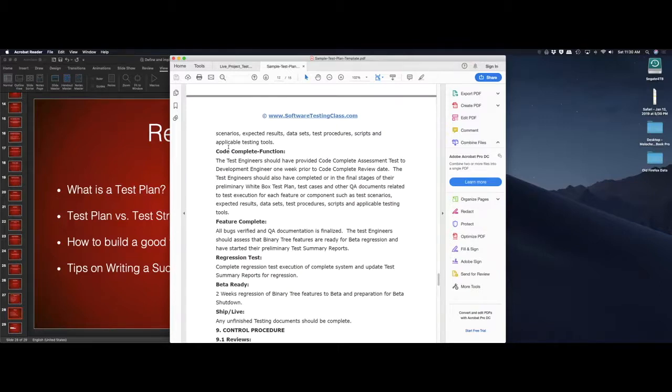So you have that first window of just getting the code done. Then it gets to QA. QA has a period of time to go through the code complete phase and go through creating defects back and forth till they think the code is stable. At that point, it then becomes feature complete. And that feature complete is when you start running all your regression testing systems against it to make sure that all the pre-known tests and bugs all still pass. Does that make sense? Yeah, it does.